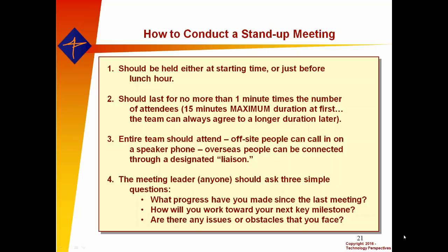So 3 questions, and this is energetic. You bang out the 3 questions and you go right to the next person on the team. One trick here: if you don't hear a person say, I have no issues or problems, ask them, whoever's facilitating. And I like to rotate facilitation among the whole team. Team leader starts it out perhaps to get things rolling, and then after that each week pick a different person to facilitate. If you don't hear, I don't have any issues, ask. Because often these things are suffering in silence, and then you find out later that it turns into a showstopper.